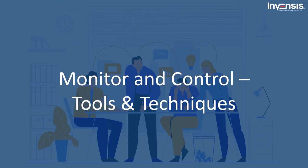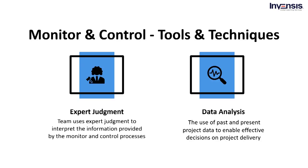Now let's talk about monitor and control process tools and techniques. To begin with, we have expert judgment. To ensure that the project's performance is as expected, the project manager and the project management team use expert judgment to interpret the information provided by the monitoring and control process. These expertise should be obtained from individuals or groups that specialize in earned value analysis, interpretation and contextualization of data, techniques to estimate duration and costs, trend analysis, technical knowledge of the industry and focus area of the project, risk management, and contract management.